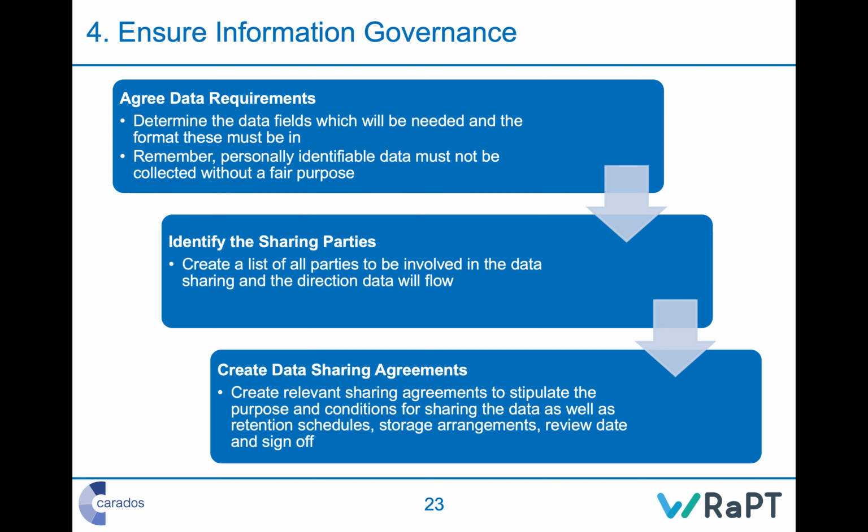And then you need to create data sharing agreements, and you should use the data sharing agreements as set out by your organization or organizations. There are some online, so you can see examples, but realistically what you're doing is saying this is the data we're collecting, why we're collecting it, when you're going to get rid of it, how you're going to store it, or the requirements for storage, when you're going to review that and deal with it, and then you need to get sign-offs done. There are various mechanisms for getting sign-off.